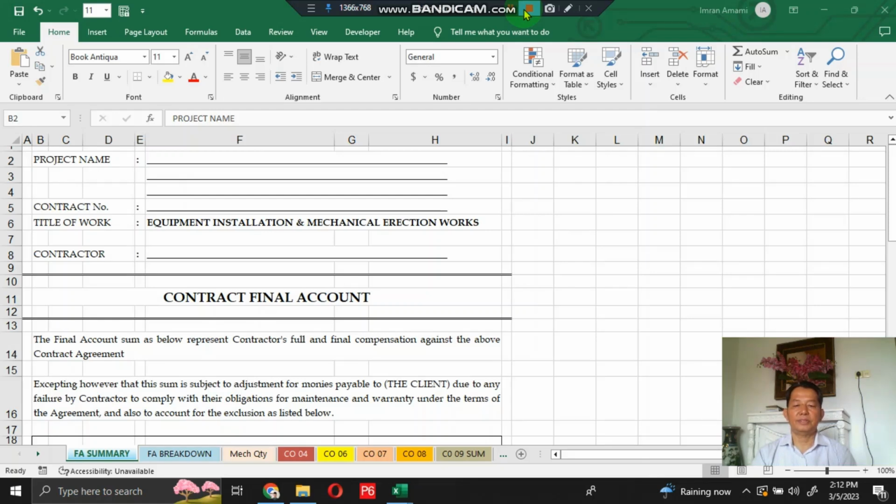Final accounts is the conclusion of the contract value, including the necessary adjustments, starting from the final contracts and supplement contracts, consisting of contract discovering, change orders, additional works, field notices, and supporting works, for example, for civil works and supporting works for pre-commissioning works. And this final accounts includes all works that are payable to the contractor according to the contract.